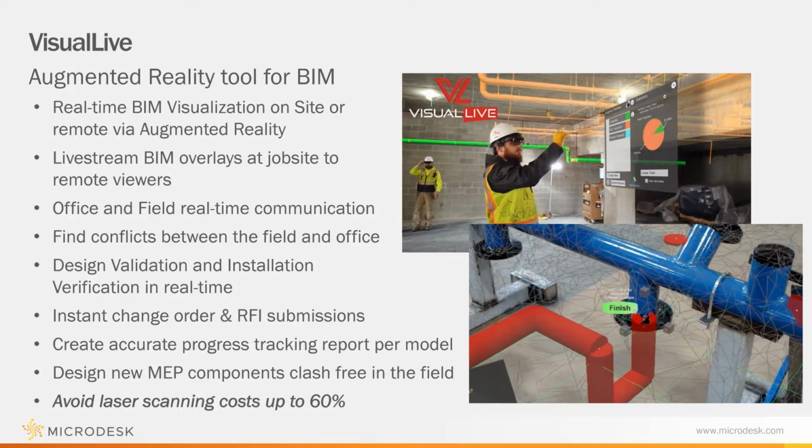This allows me to do that without needing to go out there and do setups, to have somebody walk around with, you know, a $60,000 piece of hardware and make sure that everything works, then sync 20 gigs worth of scan data across the internet back home. This allows me to avoid a lot of that. That's not to say that we don't need to do laser scanning. It just means that we need to do it much less, because this actually covers the use case that a lot of the scans were being used for.